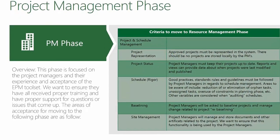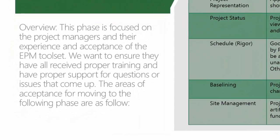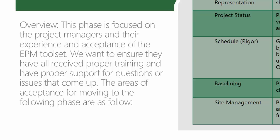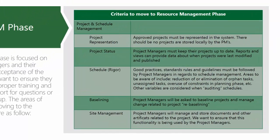When we think about the first phase — the project management phase — this is focused on the project managers, making sure they're using the tool properly, that all of their schedules are represented within the tool, that they're properly statused and baselined, and that they are using the sites. This also implies that their schedules are at a certain level, and we want to make sure that they're applying good practices.